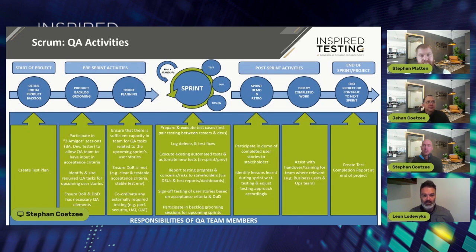I honestly can't say I've ever seen sprint minus one where at some point the organization does not need to call in a different team just to go and work on the backlog. It always happens. Or they have a pause, a refactoring sprint, which is what I've seen, where they don't do any delivery. They just do a sprint or two sprints of working on the backlog. Yeah. So we'll just do fixes and we'll just update the automation pack, but there'll be no delivery.